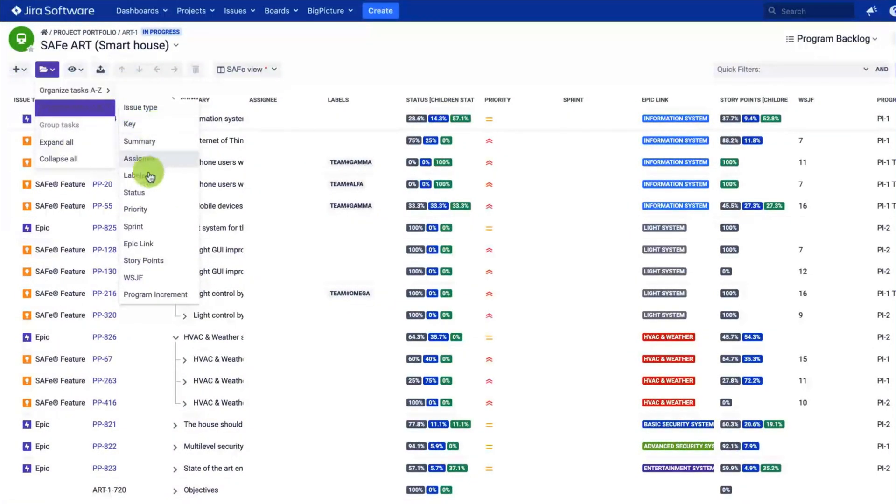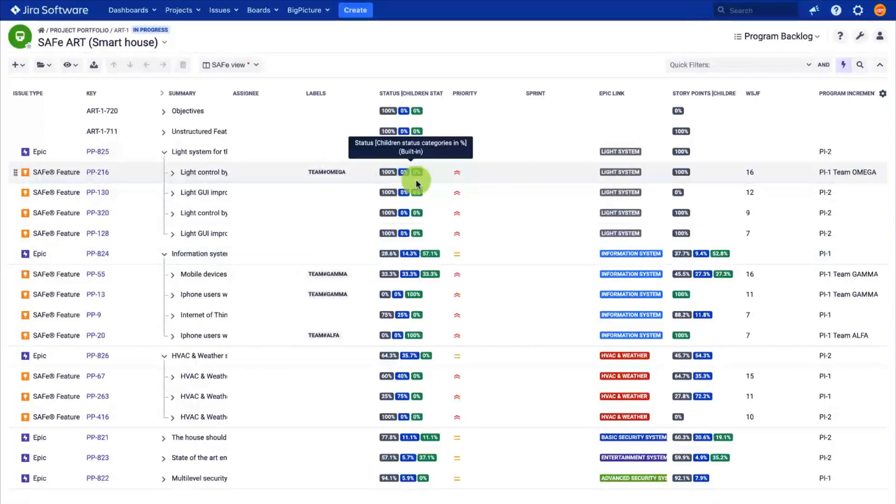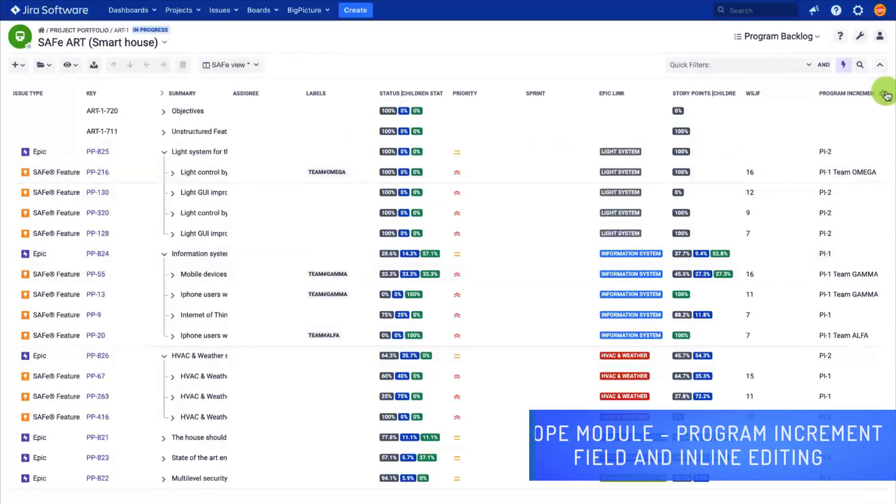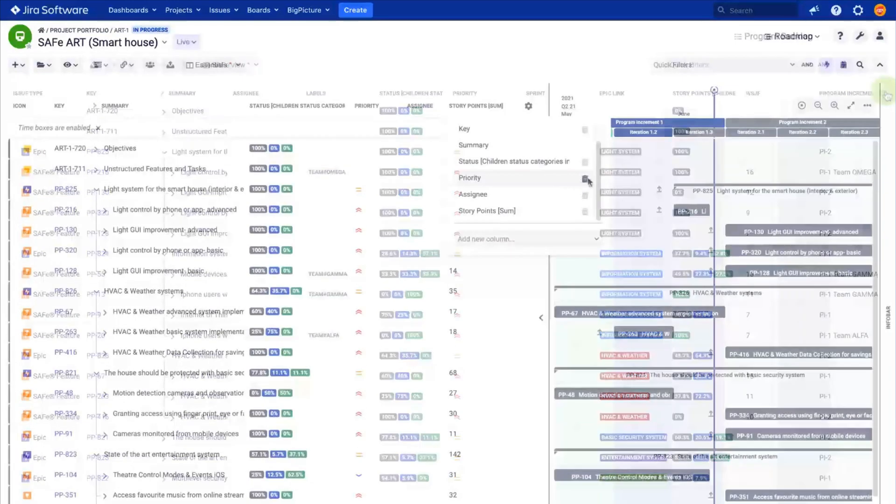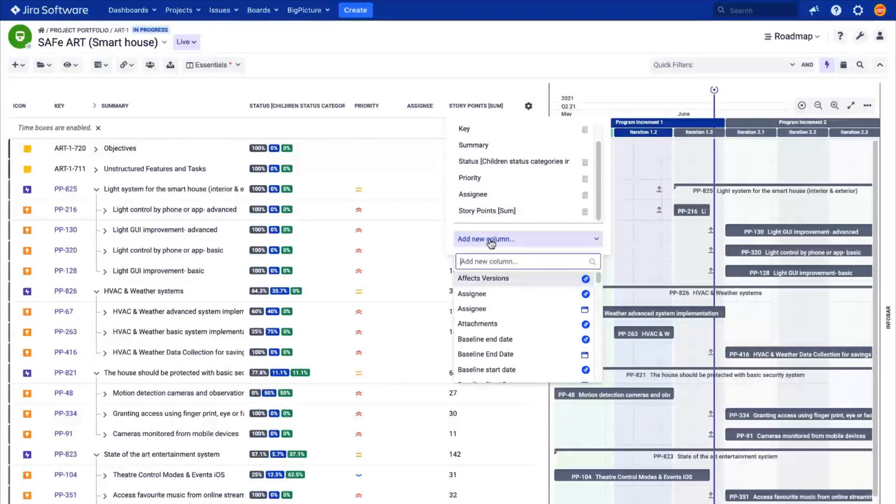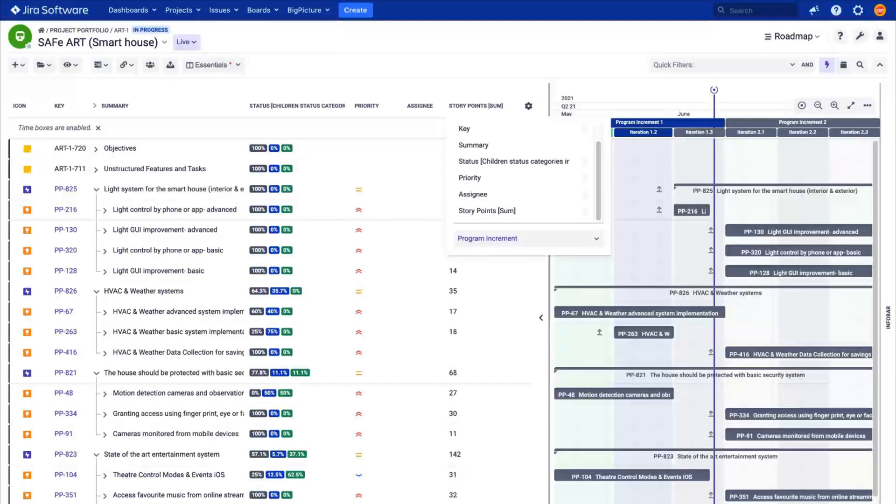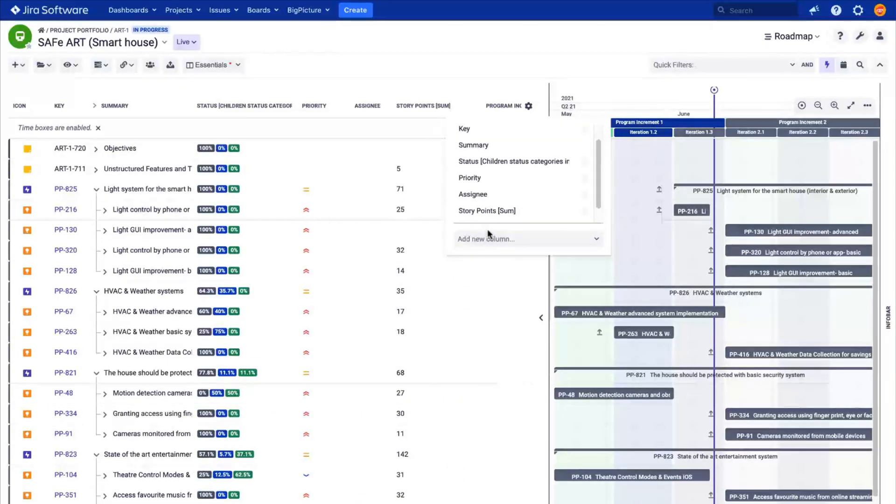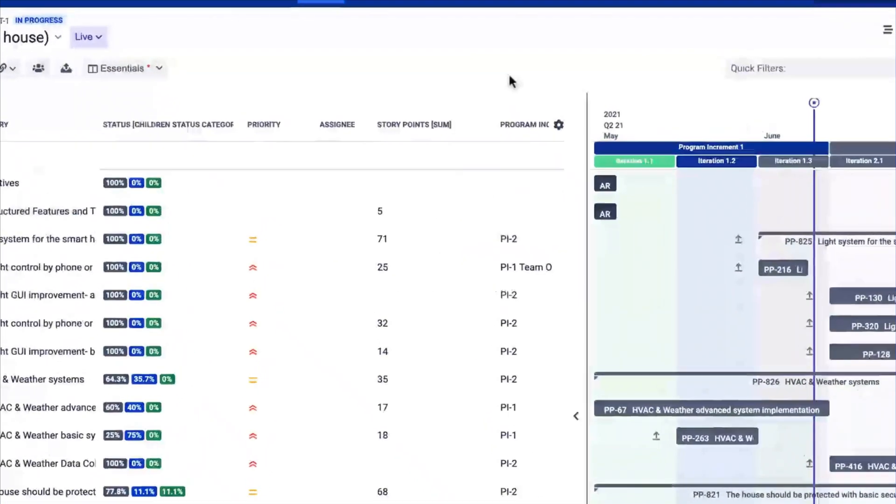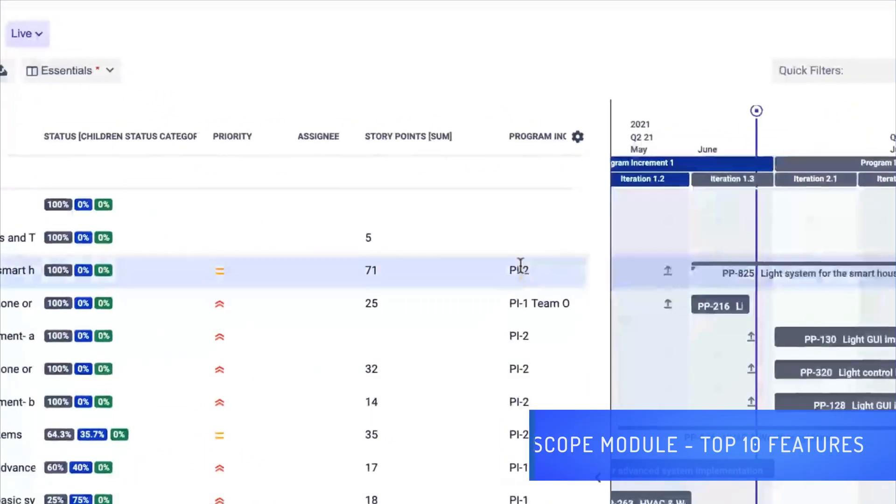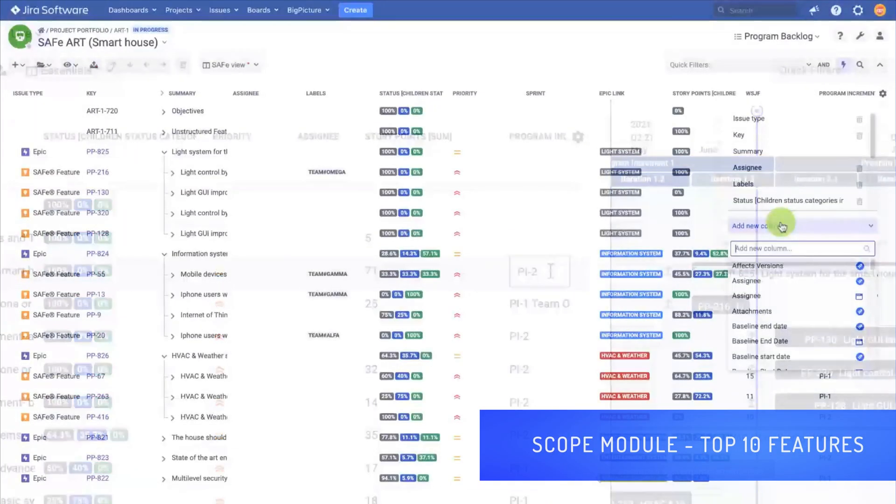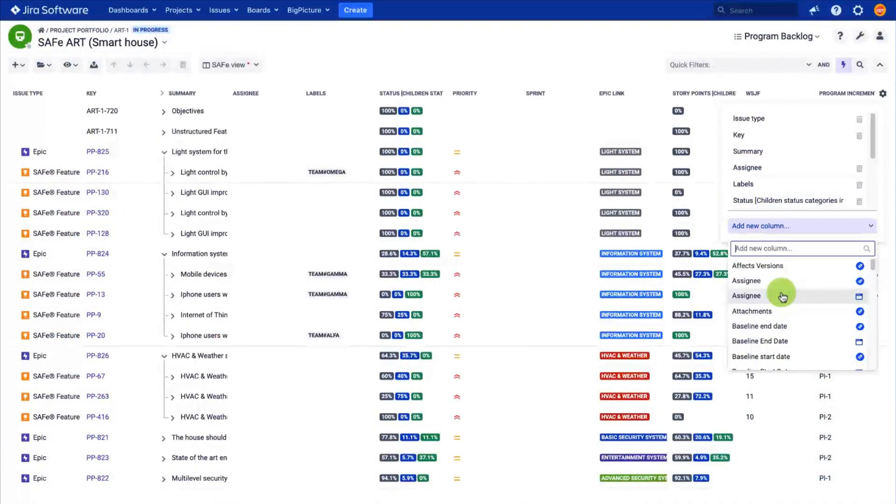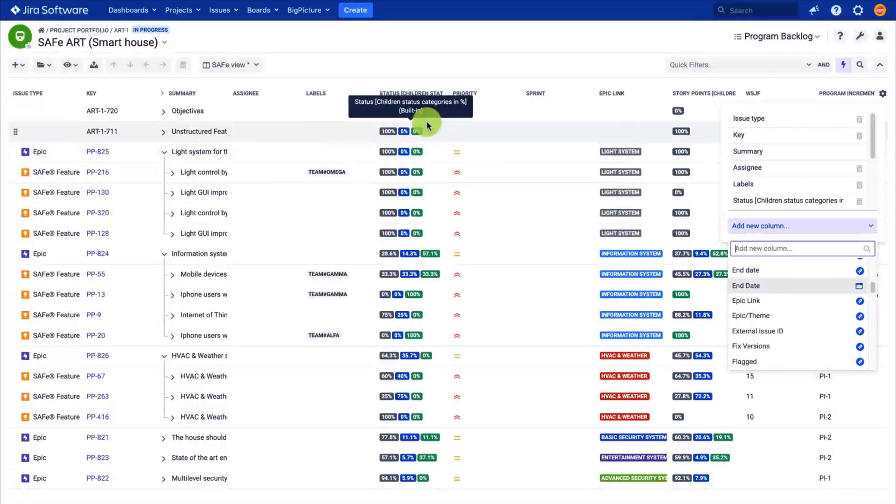Product managers can select features for development. You can use a simple script to calculate the weighted shortest job first for you. Also, there is an inline editable field added during the installation of the app so that you can assign an item to a PI directly from the interface. You can use this view together with other modules to present the context and the top 10 features to be delivered. Feel free to adjust this view by adding different fields and roll up the data to track progress.